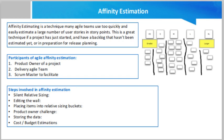Affinity estimation is simply a process of estimation of user stories in agile or scrum methodology. Regarding cost or budget estimation, two basic questions anyone may ask are: where do project cost estimates come from, and how do I get started creating a budget? The budget is the financial presentation of major cost categories specified by the sponsor.